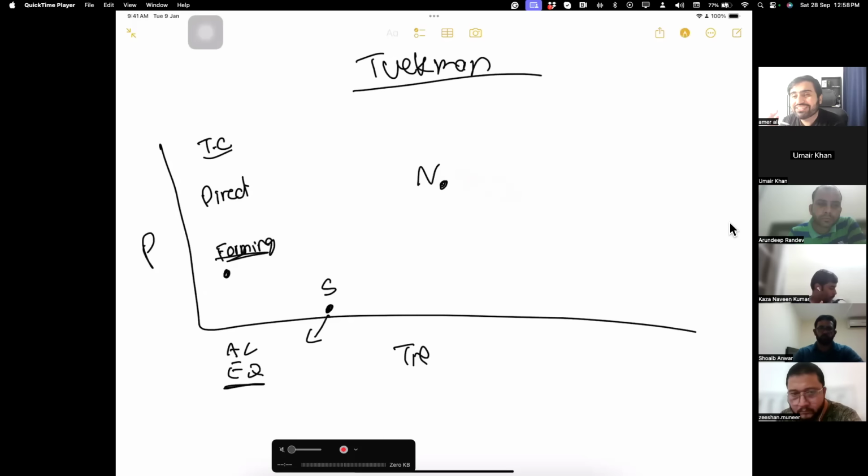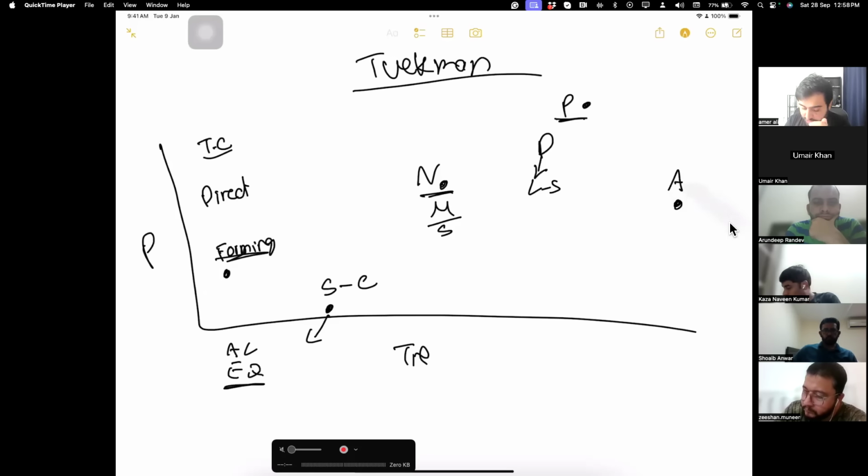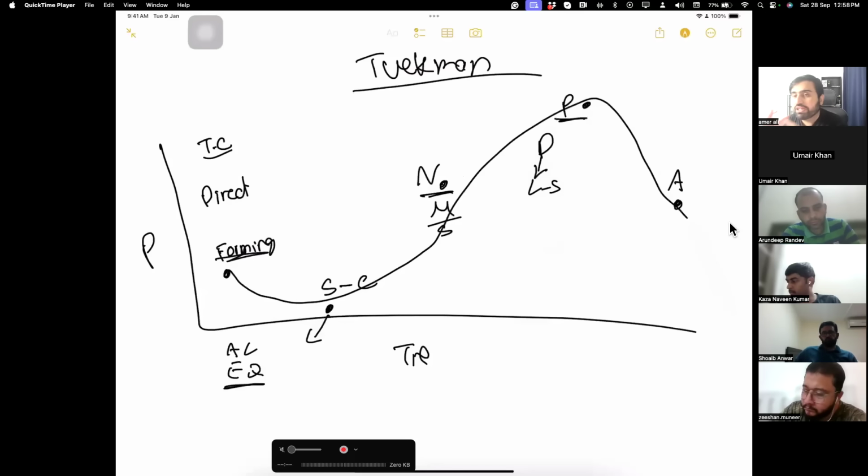Now you start understanding the habits of the team, how they are doing. And if it is handled properly, we reach the performing stage. Here you are acting as a coach, more of a mentor, or supporting. Here you delegate the task, it's more of a laissez-faire style here. Okay. And finally, when the team leaves, adjourning. So it's kind of a cyclic thing: forming, storming, norming, performing, adjourning. Everyone wants to reach this stage.